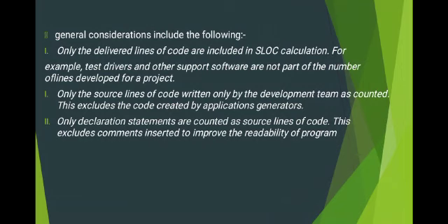Second, only the source lines of code written by the development team are counted. This excludes the code created by application generators. Next, only declaration statements are counted as source lines of code. This excludes comments inserted to improve the readability of the program.